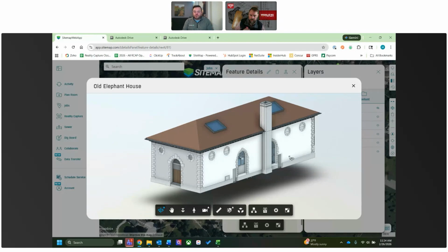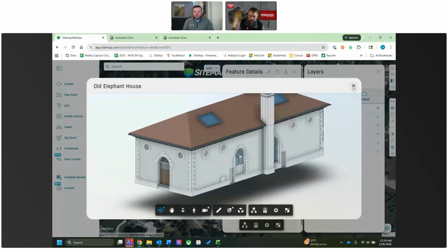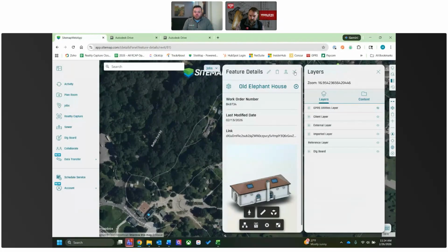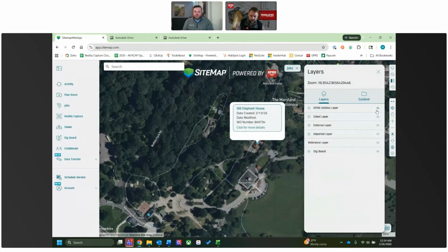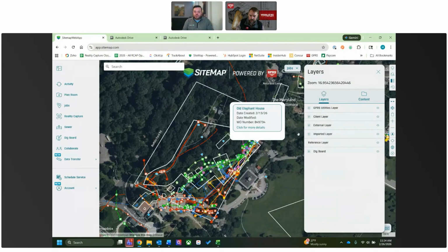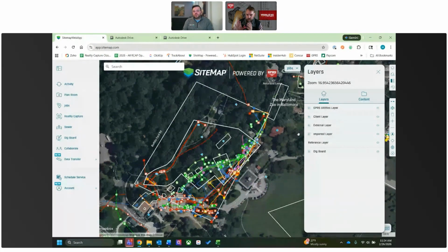Now, again, it's very dependent on the type of work that we're doing or specific scope items for the project, but you can get an idea of how soon we can turn things around. And that's not really a scalable thing. So it's not 1, 3, 10. That's correct for a 1 day job. But if it's a 10-day job where we're on site capturing a much larger facility, like a manufacturing plant or refinery, it would be 10 days on site, maybe 10 days in registration to get through that registration process. But it wouldn't be 100 days modeling. It would be a fraction of that.